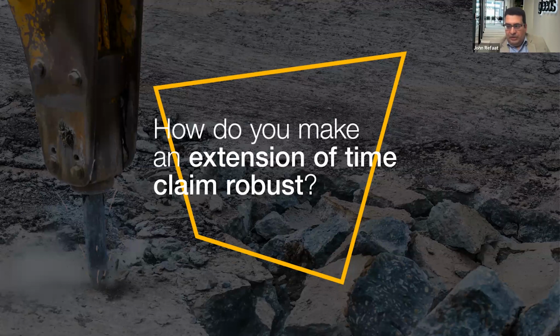prepare a program and keep it updated always. Record all the events and matters which appear to cause or have the potential to cause delays. This is a very important thing. Record when changes and variations were carried out on site, because late instructions and others coming at a later stage are important for claims. If you don't have the proper records, you cannot substantiate your case well.